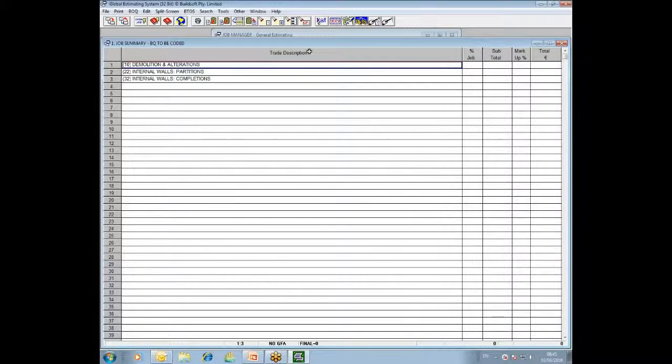And what I'd first like to look at is what are code files used for. Code files allow you to resource a bill or a tender document into specific sections or groupings of your own making. They have a number of uses, one of which we're having a look at this morning, which is resourcing this bill of quantities into trade packages for pricing by subcontractors.